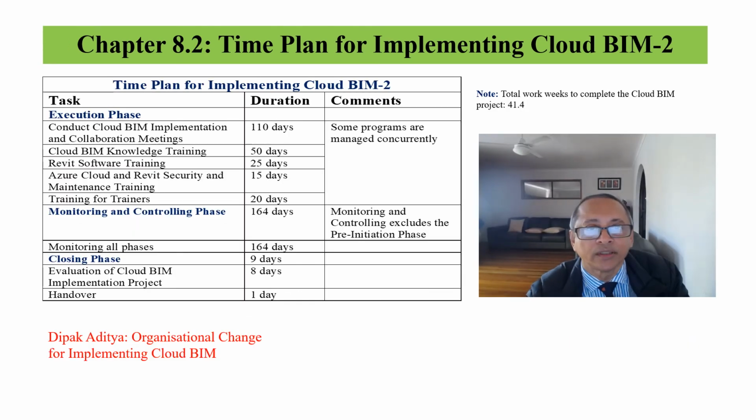Time plan. The execution phase will take an estimated 110 days, and monitoring throughout the project will be 164 work days. Execution phase includes conducting Cloud BIM implementation and collaboration meetings. Also training for Cloud BIM knowledge area, Revit software, Azure or any other cloud service security training and Revit security training. And training for trainers who will train the employees later in the organization.